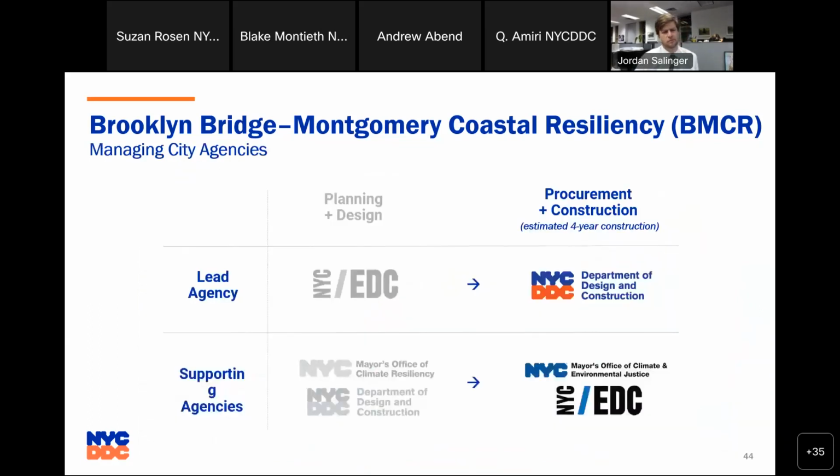Next slide, please. Just as a reminder, the planning and design phase was carried out by our colleagues at EDC with Jordan and his team at the mayor's office as the supporting agency and partner. And the construction phase was handed off to our agency at DDC, Department of Design and Construction. And we're working very closely with Jordan and the mayor's office of Climate and Environmental Justice, with all of our colleagues at EDC and the design team and the consultants to keep that connected thread and continuity. We just finished the procurement phase. Typically, that's about a 8 to 10 month, 9-month period. And we're just beginning to start the construction phase as of this month. Next slide.